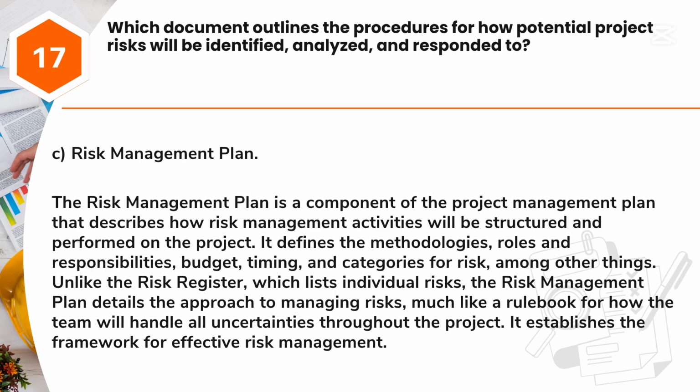Answer: C. Risk Management Plan. The Risk Management Plan is a component of the Project Management Plan that describes how risk management activities will be structured and performed on the project. It defines the methodologies, roles and responsibilities, budget, timing, and categories for risk, among other things. Unlike the Risk Register, which lists individual risks, the Risk Management Plan details the approach to managing risks, much like a rulebook for how the team will handle all uncertainties throughout the project. It establishes the framework for effective risk management.